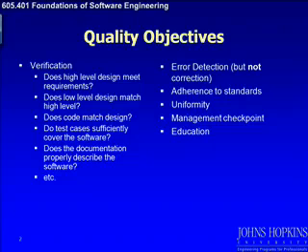of doing the job. Reviews also, various types, are management checkpoints, in that we can schedule these reviews as milestones along the way in managing the project. They will be items in your work breakdown structure for planning the project. They'll be in the schedule, and as we hold the reviews, we can then check those off as milestones along the way of managing a project, and you basically earn value for that amount of work that you've done, that you reviewed and approved everything.